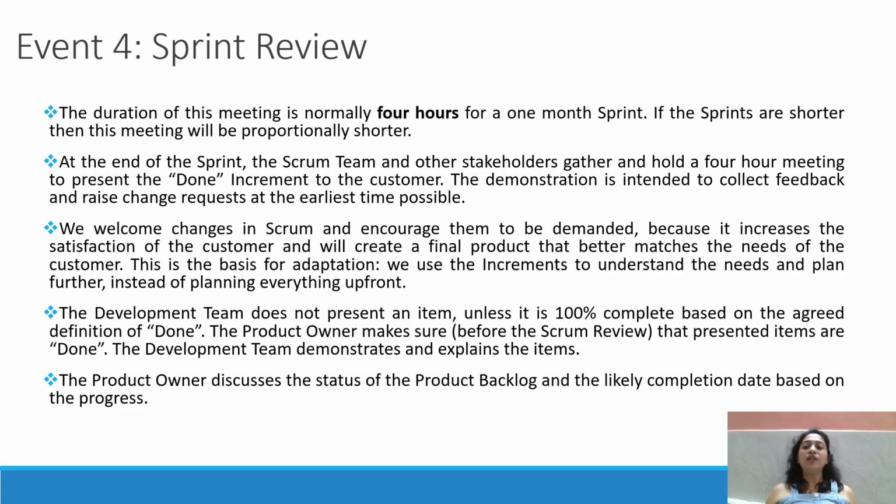Correct. If the sprints are shorter, then this meeting will be proportionally shorter. At the end of the sprint, the Scrum team and the other stakeholders gather and hold a 4 hour meeting to present the done increment to the customer, per the definition of done.